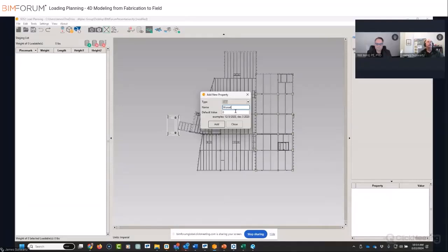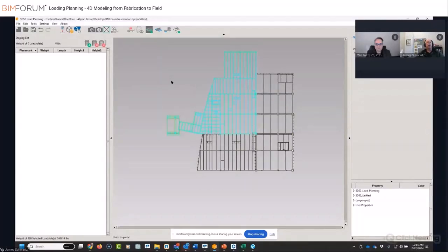A lot of people will call this a work set, which is basically breaking down that sequence into smaller portions. So I'm going to add this in, and then I'm going to select this area. And I'm basically going to say, okay, out of this entire sequence, this is what I want to start with. So then I can start loading my trailers based on that just in time method that we want to do. And let me interject a little, just background.